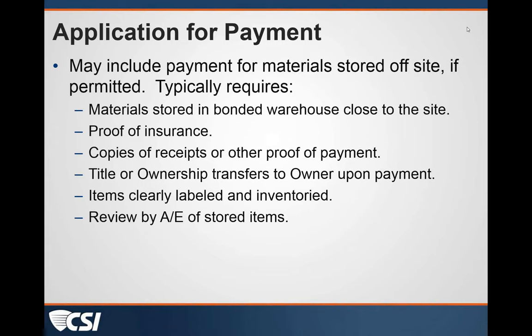This hopefully will address the question from Kevin earlier, and Kevin, if not, you can chime in. Payment applications are typically for work that is in place or materials that are stored on the project site. It may include payment for materials stored off-site if it's permitted by your general conditions and your owner.